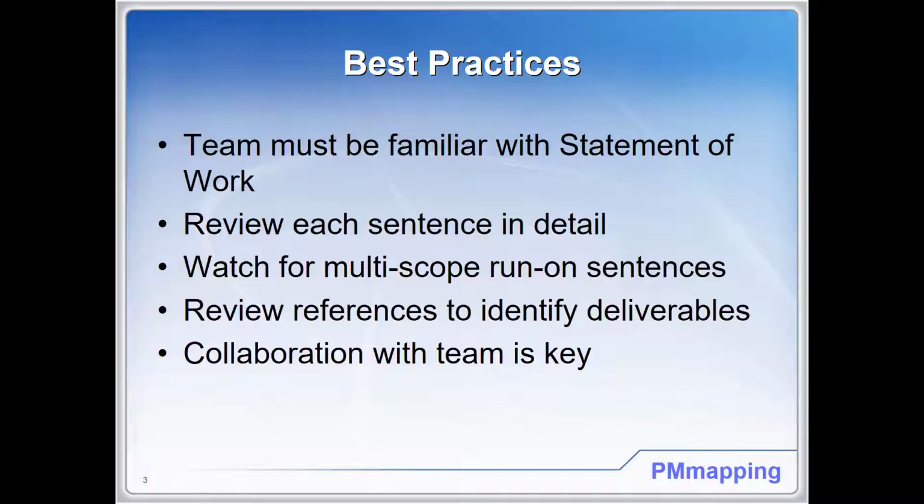Some of the best practices when you're analyzing a statement of work: remember this is a team effort and the team must be familiar with the statement of work. Make certain that you get copies of the SOW to the team in advance and allow them time to review the statement of work. Review each sentence in detail and look out for the multi-scope run-on sentences. It's so critical to evaluate each sentence and understand the deliverables and the intent.